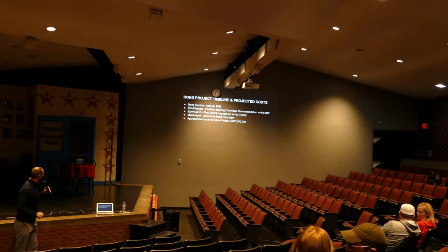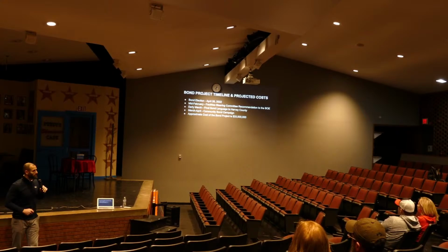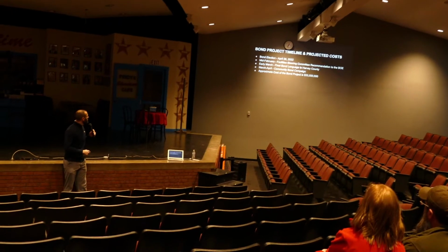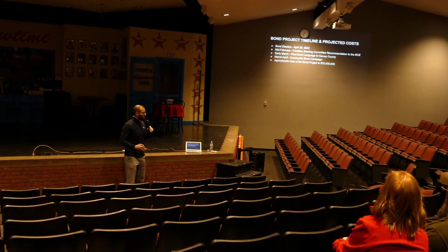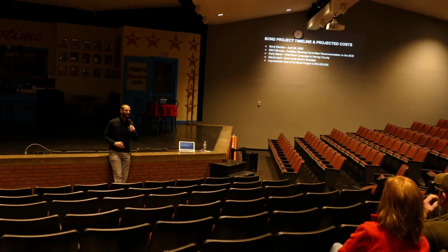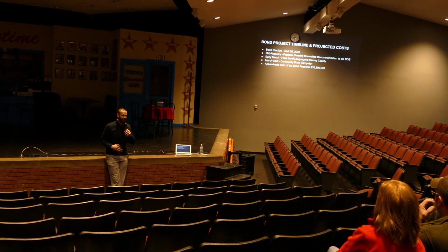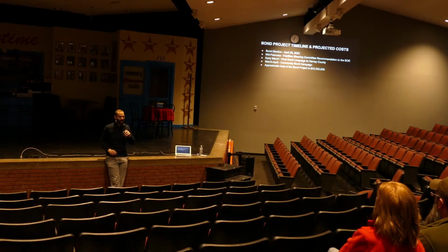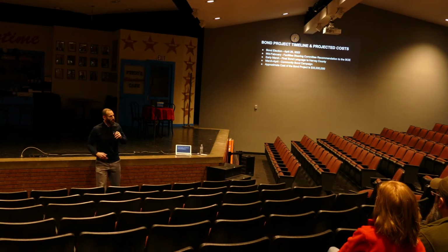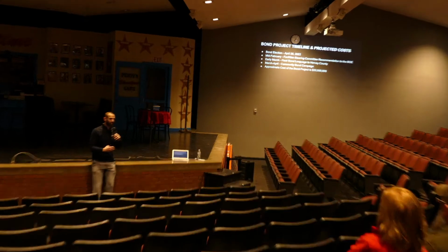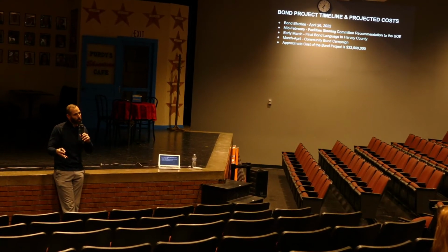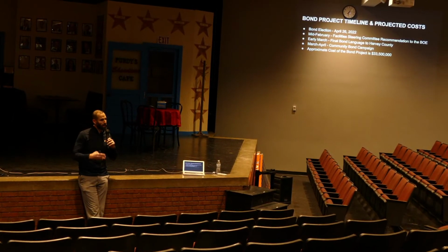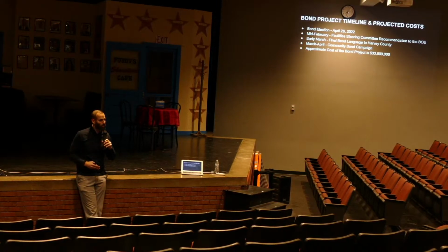Okay, so timeline. A really important date to keep in mind is April 26th. That's when the bond election is scheduled for. In mid-February, which we're quickly approaching, we're anticipating our Facility Steering Committee making a final recommendation to our Board of Education. So when we meet on Wednesday with that committee, we're going to look at final numbers. We're going to look at all those projects that you just saw. That's what's in our bond resolution that was passed in December. And we want that committee to make a formal recommendation to the board to consider.